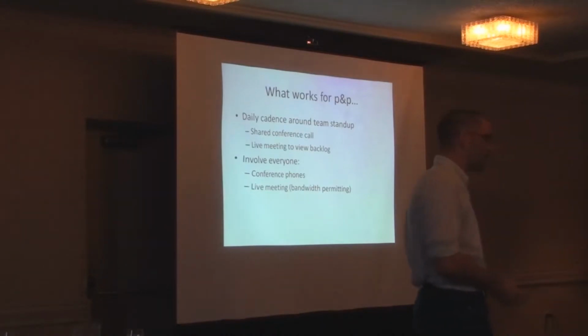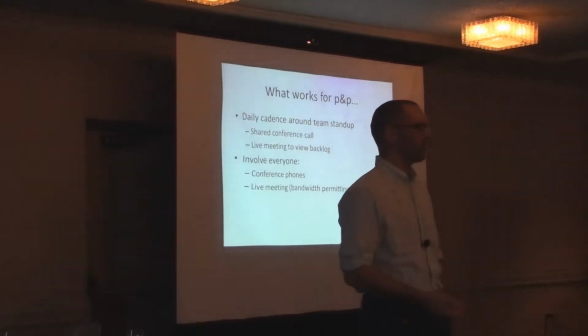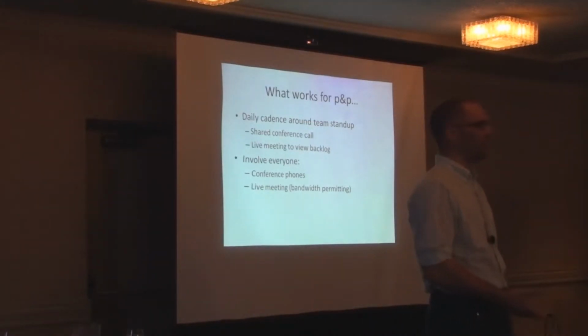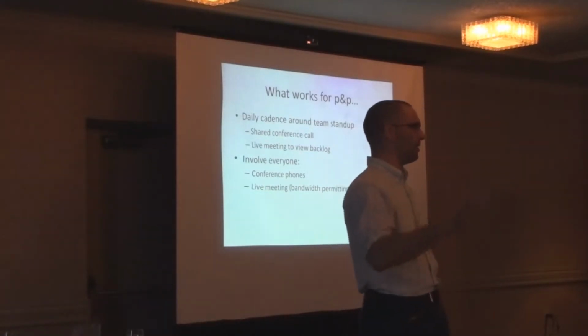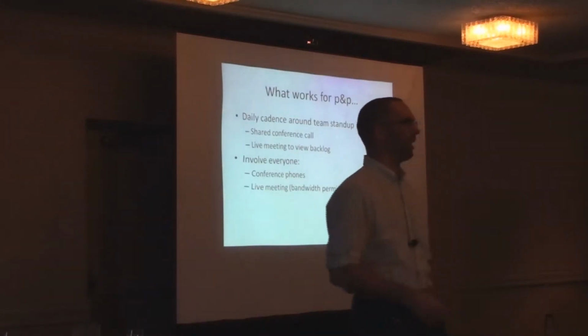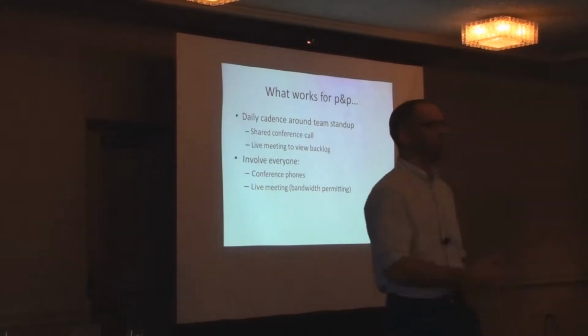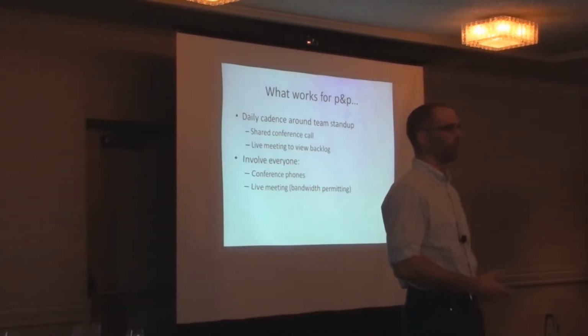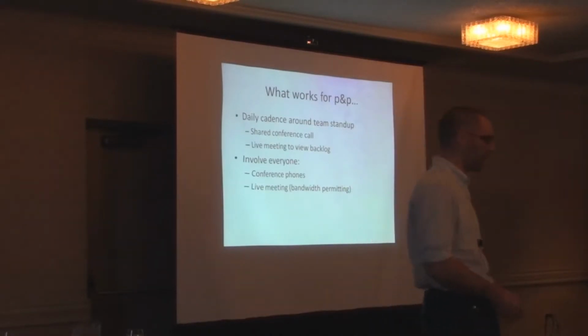One of the interesting things we've discovered is that everyone says, oh, well, you can use Live Meeting and webcams and all this sort of stuff. It's very bandwidth dependent. I don't think twice. I was on a conference call this morning back to Redmond, and I had Live Meeting or one of these conferencing tools open, and I had real-time video and voice going. You try doing that to parts of Buenos Aires, and it just doesn't work so well. So I guess what I'm saying is, if you're deciding to do this and you're picking an outsourcing company, you should make sure that they have reasonable connectivity. Otherwise, you're going to be back to phone lines and not much else.